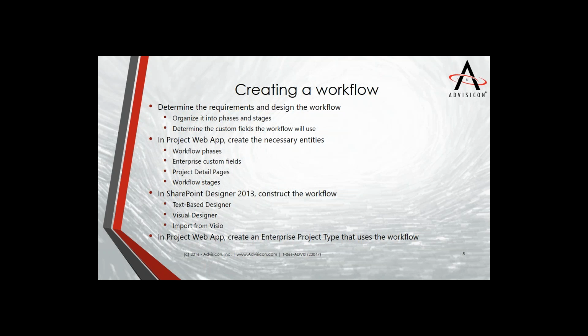After you've created the basic information that you're going to hook to in Project Web App, you then go into SharePoint Designer, which is a free tool from Microsoft, and construct the workflow. And you can do this by using a text-based designer, which I'll show you today.